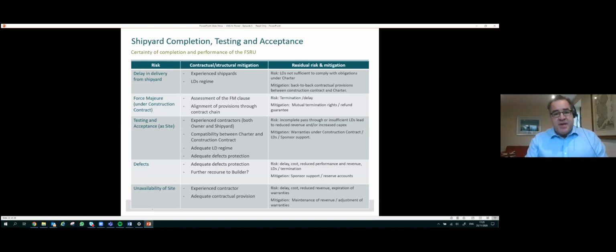Now, whether the FSRU is being constructed as a new building or converted from an existing LNG carrier, from the time that the charter and the underlying construction contract are executed, there will be close coordination between the parties in relation to the construction of the FSRU and the construction of the power plant and accompanying jetty and pipelines. For obvious reasons, the project will want to make sure that the FSRU is delivered by the FSRU sponsor and will be accepted by the project at the project site no later than the date at which the site facilities are able to receive a commissioning cargo, and certainly no later than the date on which the power plant is able to accept feedstock gas.